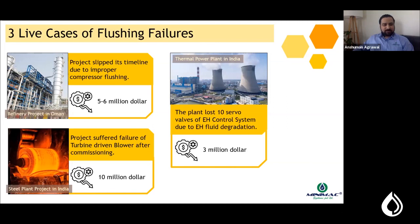The second live example is a steel plant in India where a turbine-driven blower was being commissioned and the lube oil system of the turbine failed miserably just after commissioning. The impact was around 10 million dollars.